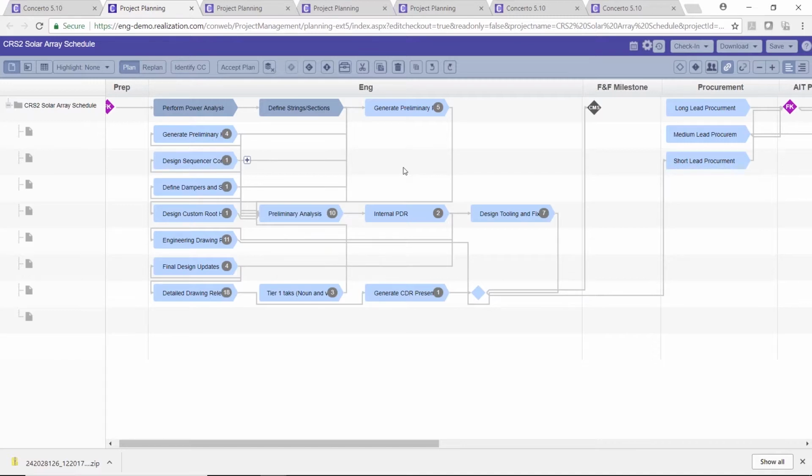So here I have the development of a solar panel, or a solar array, that's being developed. This involves doing some design work, then procuring the materials, and finally doing the assembly of the solar panel itself. In terms of the engineering, I have different streams. Not everything's in series. I have different streams of activities that have to happen in parallel. But you can see now that what was in their original plan as about 30 to 40 different activities or tasks needed in engineering has now been grouped into only about 10 different tasks. And to different degrees, they have different numbers of subtasks underneath them.